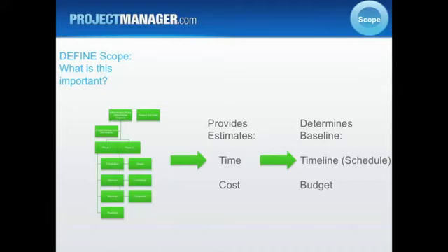It also produces the information for the cost. That information is important because it feeds what ultimately becomes the baseline of the project. The time built out in total with all the dependencies required builds a timeline or the schedule, and the cost ultimately identifies the budget.